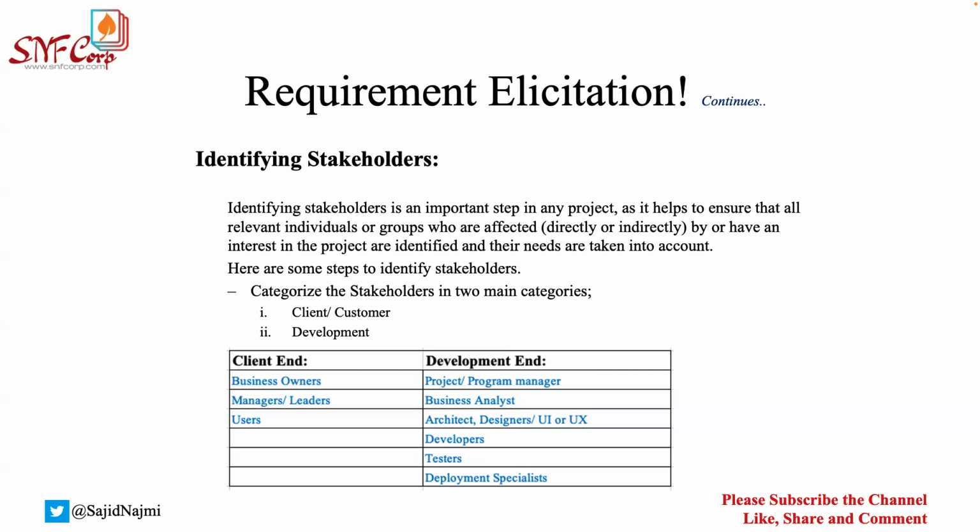By the time I'm delivering the project, I'm getting this signed off from the business and the project is officially closed, I'm not going to stop working on the stakeholder register. I continue working on that and keep revising it. And then when everything is done, I'm going to go ahead and upload this document to business repositories as per the company's policies. The stakeholder register is not your personal belonging. This is your company's belonging. They own it. So you have to give it to them so that any new manager or new team members, if they're working in a similar project, can use all those documents.